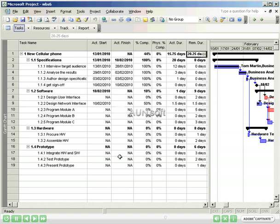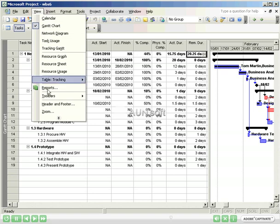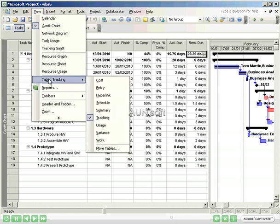Microsoft Project provides a view to see exactly how activity has varied from our estimates. To do this, Main Menu, View, Table, Variance.